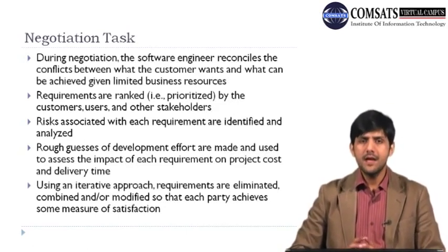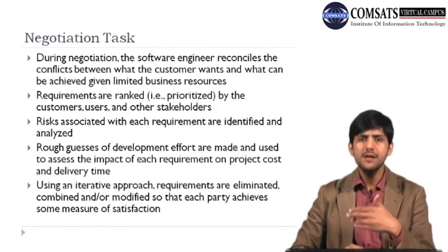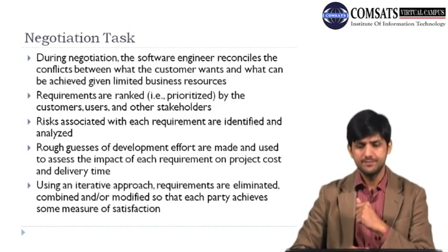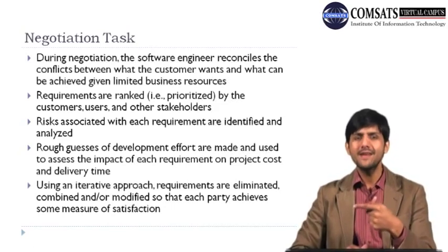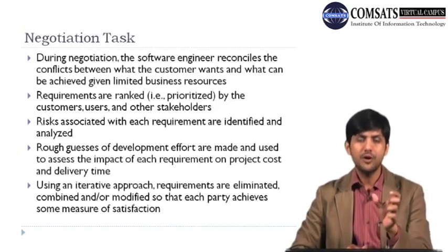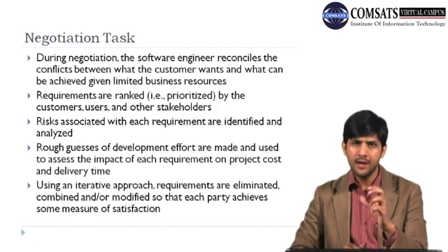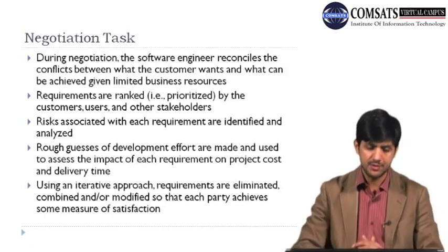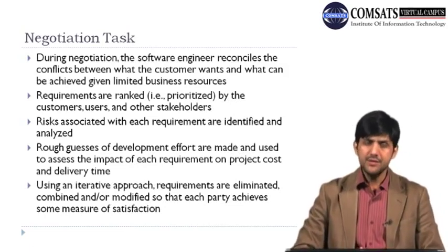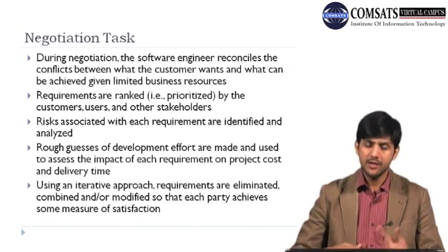And then another thing that is done at the negotiation stage is you try to make rough estimates of the development effort, and you do it because you want to analyze the impact of each requirement on project cost and delivery time, because this gives the client an indication of how costly or how time consuming a certain requirement is. And then using an iterative approach, requirements are eliminated, combined or modified so that each party achieves some measure of satisfaction.